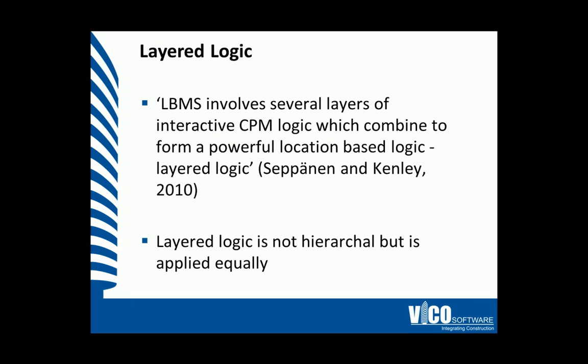Location-based management systems involve several layers of interactive CPM logic which combine to form a powerful location-based logic structure. Layered logic is not hierarchical, but is applied equally. One could argue that location-based logic is an extended CPM logic. However, as you will learn, CPM algorithms do not support continuity requirements needed to perform location-based planning.